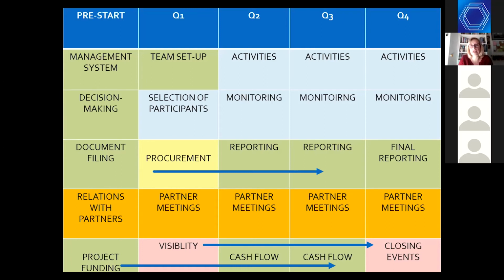Instead, when you are doing it in the last quarter or even the third quarter, and then you have to repeat it, and then you have to renovate the premises and buy equipment and set up, you have a problem. That's a very common problem with renovations and equipping: at the end of the project implementation, we have a lovely space for some, let's say, community center, but it's not operative, or it was not operative during the lifetime of the project, because instead of doing that work at the beginning, we put it later on, we had delays, and we actually didn't work with the target group in that center.